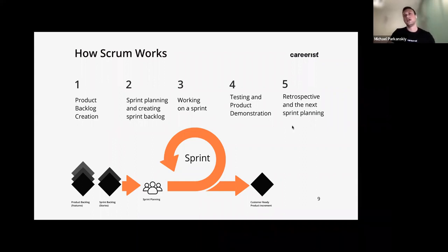and then it's going to be released to your customer. And at the end of the sprint, you're going to get on a call and have a retrospective, where everyone gets on the call again and you all have a conversation about how did it go? Did we get to all of the things that we put in the sprint? Did we fix all the bugs we wanted to fix in the sprint? Because if we didn't, that bug that didn't get fixed will be put onto the backlog. And in the next call, maybe next week on Monday, you get on the call and look at the backlog of tickets that are there, and you start picking from it again for the next sprint.